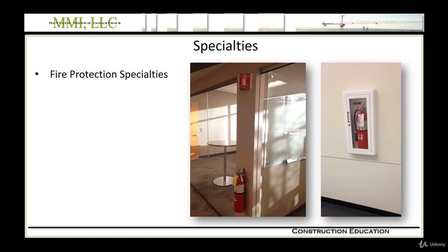And one last note on the construction side, fire extinguishers should not be placed in the cabinets or mounted on walls until the last possible moment. And that's because as soon as you put them out in the hall, one of the trades is going to grab it and use it for fire watch in whatever work they're doing. So these are the permanent fire extinguishers, not for construction use, so often the GC collects all these and disperses them at the very last moment.